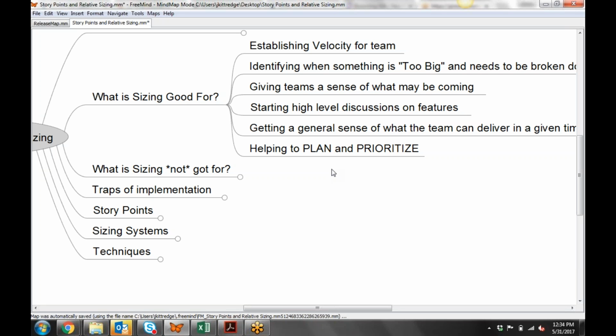When you're doing prioritized planning with backlog, this is an important thing to know. What is the relative business importance of this item compared to everything else? And that's something that gets ranked by services, people who represent the customer, that sort of thing. So then you need to take the level of effort, and you need a way to measure that level of effort. And StoryPoints is a way to do that.